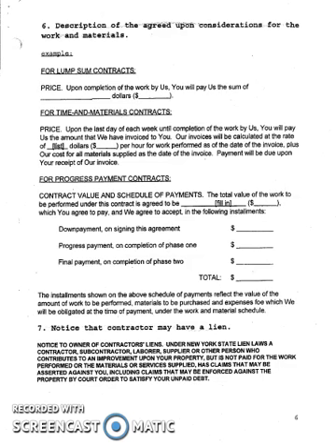Number 7 speaks to liens, where if the owner does not pay for the work that's being performed, the contractor has the right to put a lien on the project or the house. This is called a mechanics lien, which you'll learn more about in your readings. And really what that is, it puts a lien on the mortgage of the home, so the home cannot be sold or refinanced or anything like that until the owner actually pays for the services that were being done.